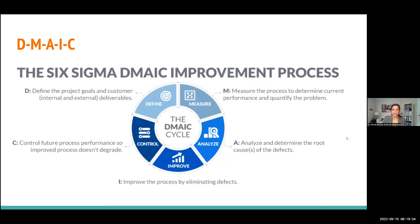Another framework is the Six Sigma DMAIC improvement process, adapted from other industries. First, Define the project goal and deliverables — what are you trying to achieve? Then Measure current processes to quantify the problem. Analyze to determine root causes. Improve the process by eliminating those root causes. And Control — sustaining future process performance to ensure your improvement doesn't degrade over time and developing sustainability.